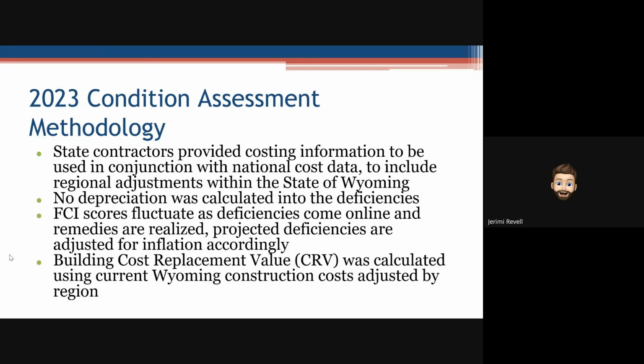The 2023 condition assessment is more forward-looking, so there is no depreciation calculated into the deficiencies. However, as those components and systems are projected to come to an end of life, those deficiencies come online as we're looking into the future by year. And I think that's going to be a helpful planning tool for a lot of the districts.